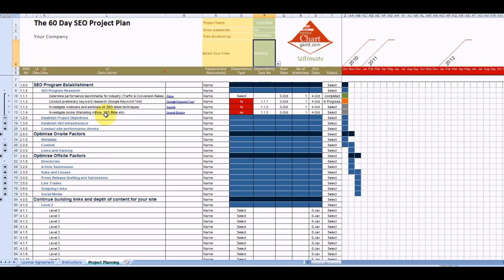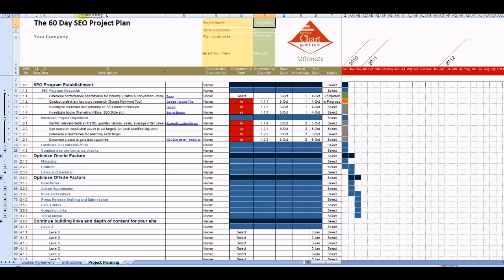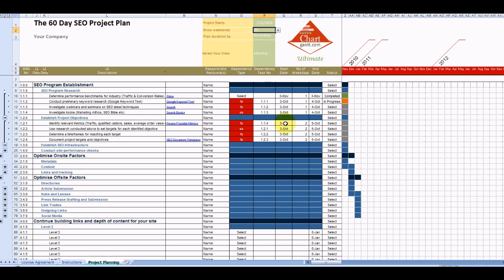Now what this plan does is it enables you to automatically update the date. There are dependencies between all of the tasks which means that if you're starting your project let's say on the 1st of November, as long as we update the project start date then all our project tasks will update.